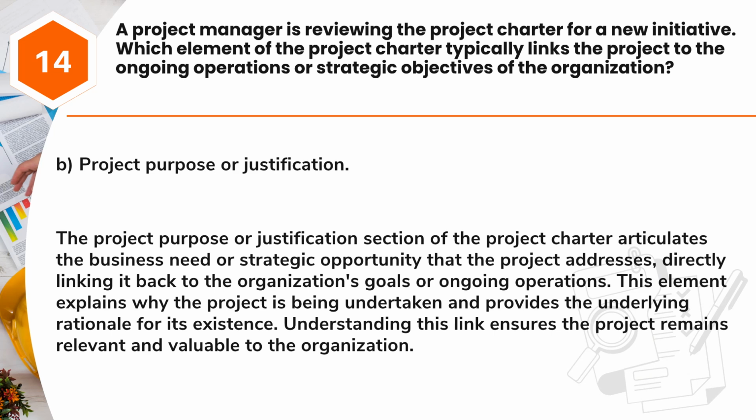Answer: B. Project purpose or justification. The project purpose or justification section of the project charter articulates the business need or strategic opportunity that the project addresses, directly linking it back to the organization's goals or ongoing operations. This element explains why the project is being undertaken and provides the underlying rationale for its existence. Understanding this link ensures the project remains relevant and valuable to the organization.